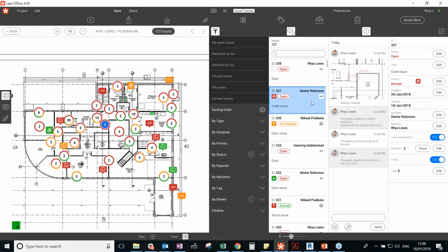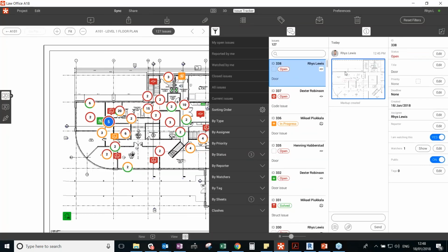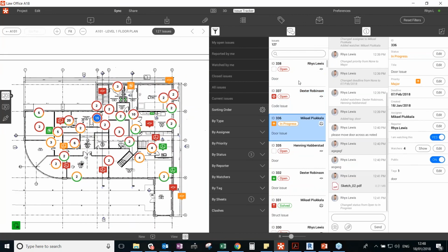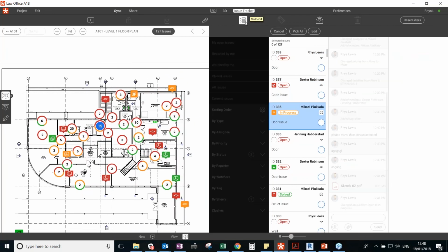So that one actually allows you to multiple edit issues. So I can go in here and maybe I've filtered the list by all issues that have been assigned to Arup, and because we're in a review meeting with them as we speak, we want to push those issues out a couple of weeks. And all those four have been updated.